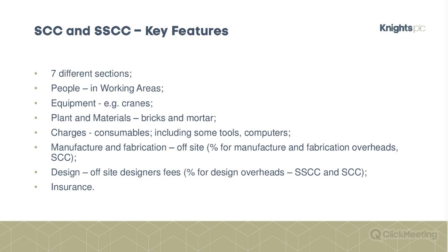And finally, insurance. I'm not going to deal with insurance because it's not particularly relevant. It's to do with how money is to be allocated if there is an insurance claim made during the project and the insurers make a payment, so who gets the money, etc. So it's not relevant to this. Please do not think that this entitles you to claim insurance premiums under this section. It doesn't, and I'll come back to that. Insurance premiums are covered within that fee percentage that we looked at earlier.